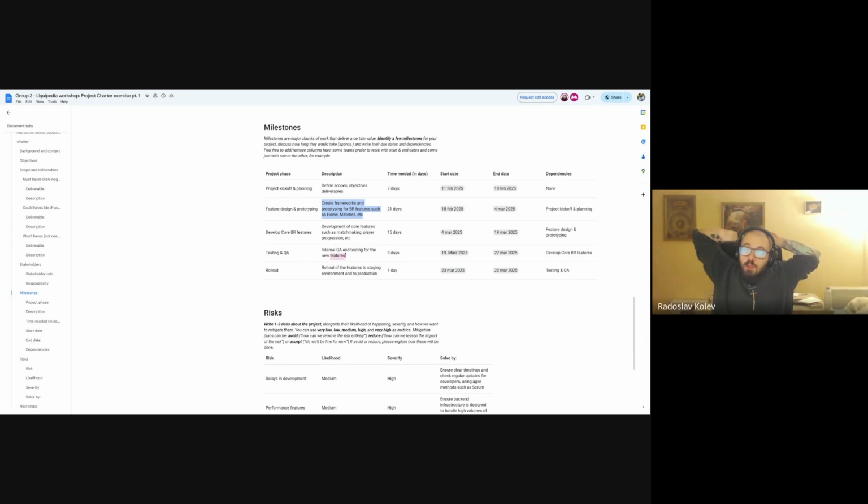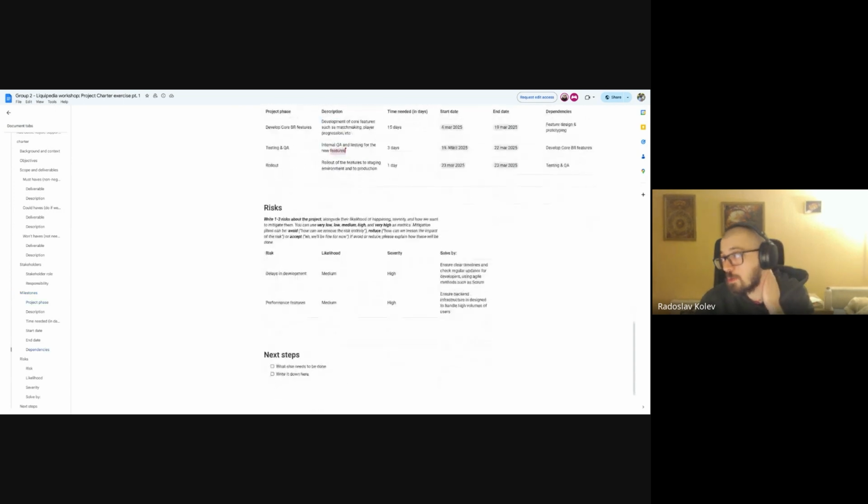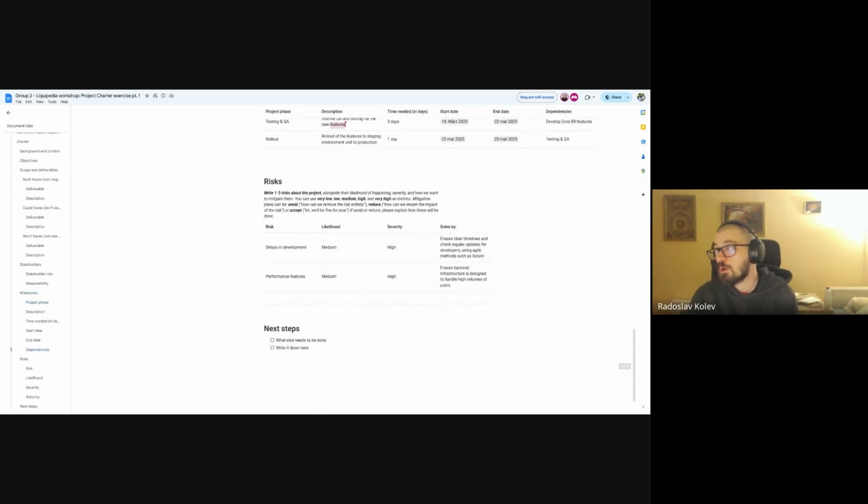That's actually very accurate to what we actually did, including your estimations. I think design took indeed about 3 weeks. I think the core battle features indeed took about a sprint and a half, maybe 2 sprints. Testing in QA was a bit longer, but you're pretty close to the actual truth of what happens with this feature in reality. So really good.